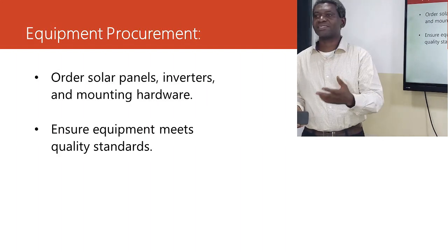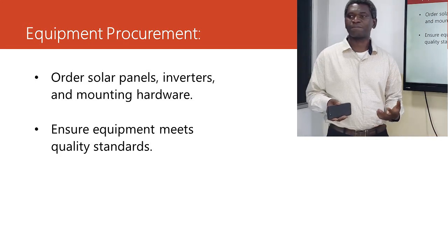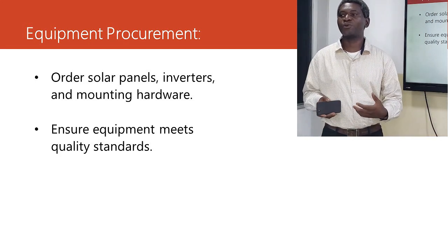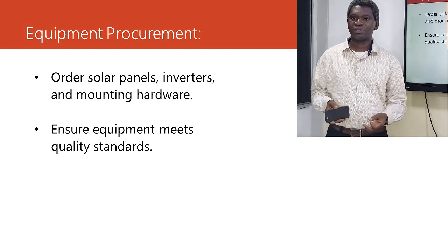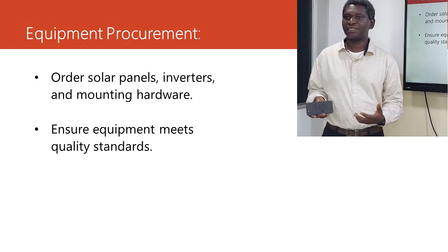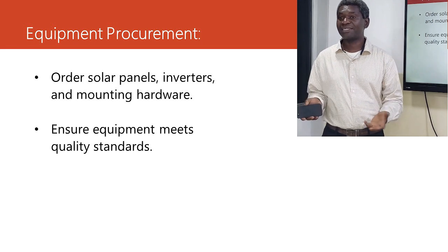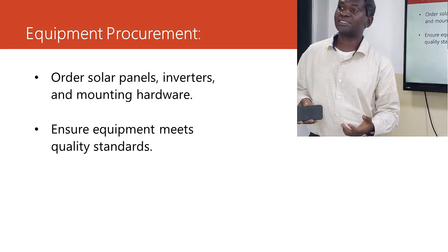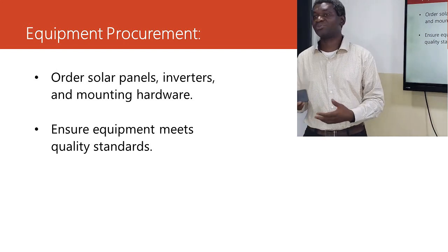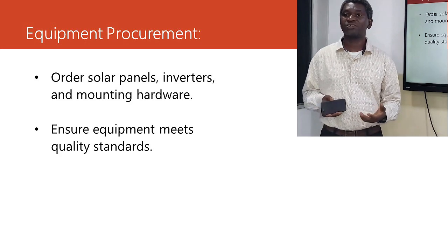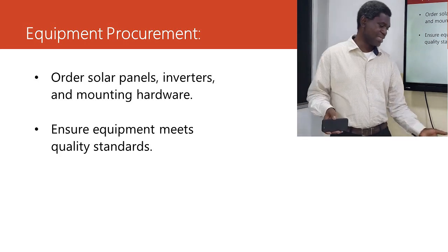So the next thing is equipment procurement. Why did I put this? I included this because, of course, you know, in BaseCom, before we do any procurement, it has to pass through PMO. I'm sure all of us know that. It has to pass through PMO. There has to be what we call a PID, project information document. There has to be a budget cost sheet. There has to be a material request. So all of these things are under this equipment procurement.